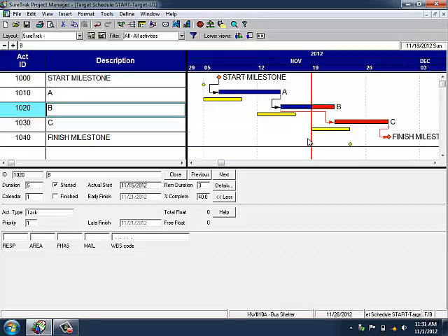And then we met with the 2 schedulers, with the 2 companies, and we walked through with them and we established the numbering and version numbers and file naming protocols for the entire job. It's a big deal. What's the number and the version that prints in the lower left-hand corner? We actually discussed it, wrote it down, and put it in the meeting minutes so we could read the printouts. And they gave us a printout every other Tuesday based on the prior Friday's work or Saturdays, every other Tuesday for 2 years. That's what an owner's meeting is about.